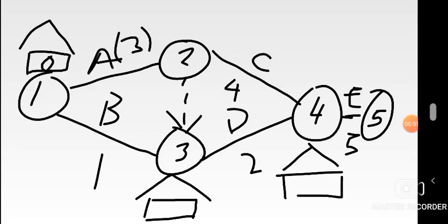Let's go to node 2 now. Node 2 starts after 1, right? If you've noticed, it's branching from 1. Meaning, there has been 3, if we're looking at days, meaning there's been 3 days for node 2 to emerge. Meaning, the earliest start time that node 2 can start is after those 3 days have passed. So you put 3. Make a small box, 3. Okay, a small 3 there in your rectangular box.